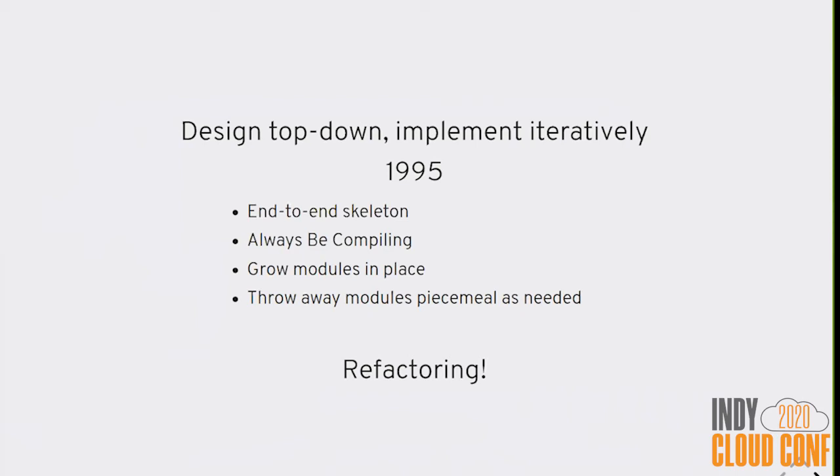Now, bear in mind, this individual skeleton, this initial build, could take a while to make. This is not your first sprint gives you a skeleton. Building that baseline skeleton could still be 40 to 60% of your total project. That's okay. Anyone telling you that every sprint needs to have a fully working end-to-end system has never actually worked on real software.